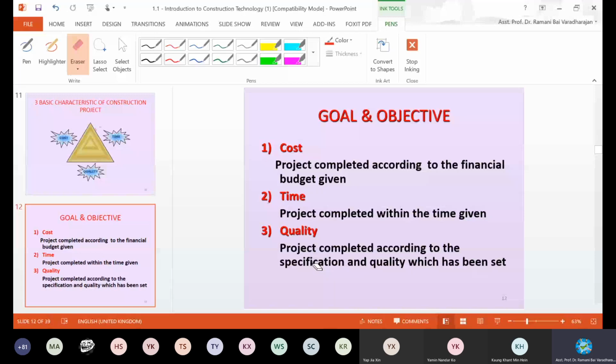So that's why I told you yesterday also, I mentioned this one. They always do two types of drawing, right? One is the drawing for planning at the very beginning. After completion, they do an overlay with the red line, red ink, on the same drawing, to show whether the planned and the completed one are similar, or what differences there are. So the specification should be maintained unless there is a real requirement by the owner or the client, then you can change it. Otherwise, you should follow the specification, and make sure that whatever is demanded is supplied. Okay.